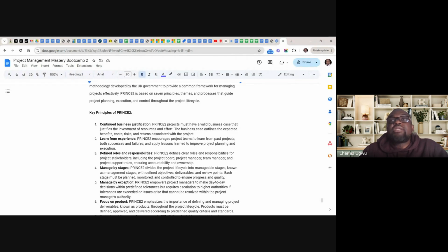If the project is no longer viable at some point, then you might think of closing the project according to PRINCE2. So a PRINCE2 project must have a valid business case that justifies the investment of resources and effort.